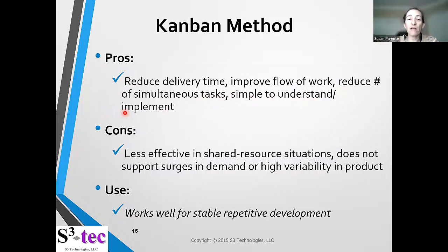Another great thing about it, Kanban can be used with a team of any size, including an individual. So I use it for myself, and I also use it when I work in teams. I rarely have a team where there's 5 to 9 people that are dedicated and only working on that one project and not doing anything else. And if I have that situation, then Scrum would be best.